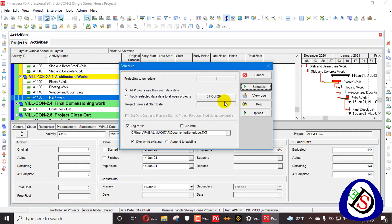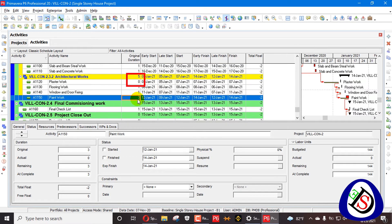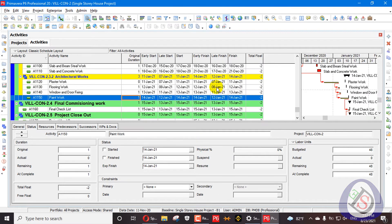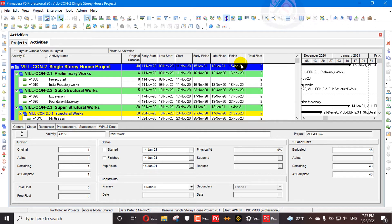This activity has 3 days remaining. When I schedule on the 7th it goes to zero, and when I go ahead to the 11th it impacts this activity with 1 day remaining — until you achieve your target it will bind your project. My project finish date remains the same. Whenever you want to fix deadlines for procurement or any item with fixed deadlines, use this feature. I don't recommend it in a baseline schedule, but you can use it 3 to 4 months before the end of the project when in delay.